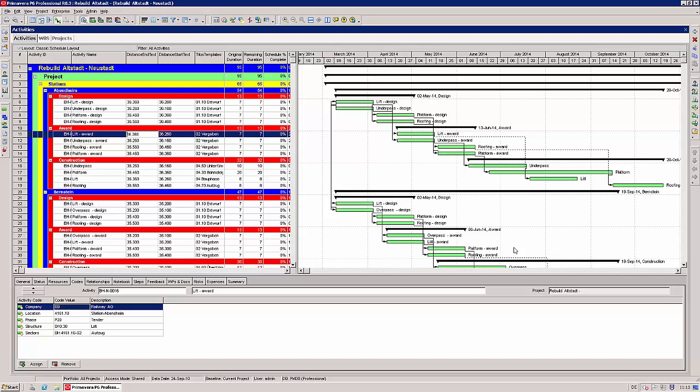The user-defined fields distance start text and distance end text contain, for each activity, the coordinate on the distance axis. A user-defined field Tilos template contains the names of the Tilos template for each activity. By this, the presentation of the task in Tilos is controlled.